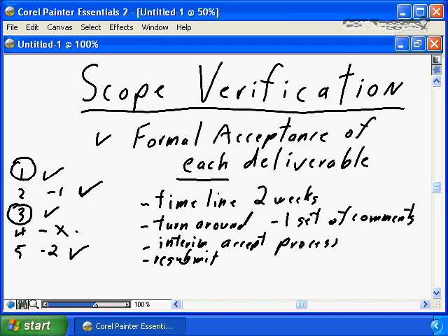Section number 4 gets reviewed this time, and again, there are some minor flaws. This time there are 2 minor flaws, and the team goes away and reworks them. So again, you resubmit, but at this point in time, with your interim acceptance process, the only thing that's open for re-review are those 2 minor flaws in section number 4. You resubmit a second time, and again, assuming your team does an adequate job of correcting those minor flaws, at this point in time, the document is formally accepted.